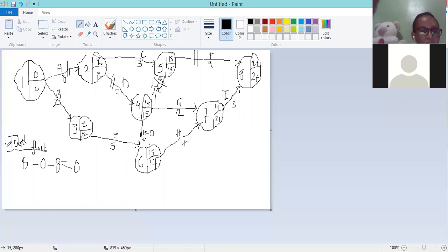So that is one of the floats which we do compute. And if I take you back again to the document I sent you on the definitions about the floats, total float is a period of time, normally called the space time or slack, that an activity can be delayed or start at a later date without affecting the overall completion time of the project.